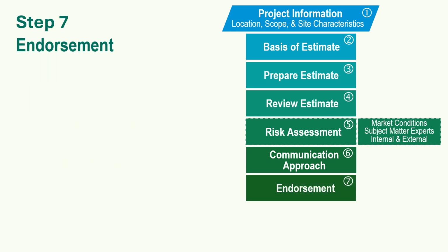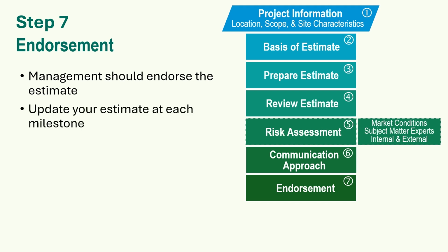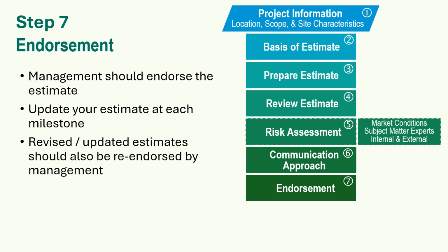Step 7. Endorsement. Management should endorse the estimate. Continually update your estimate at each milestone, revisiting each of these 7 steps as appropriate. Revised, updated estimates should also be re-endorsed by management. This is the complete cycle of cost estimating for your project.